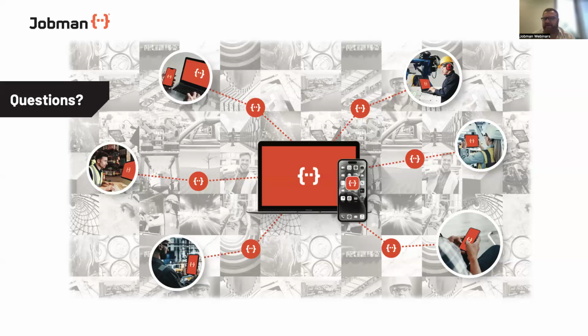You can put whatever you like in the SKUs field. That's not a problem. But what will break is your purchase ordering. The idea behind SKU fielding is that the SKU is determined by the supplier. The whole point of that is that the supplier is the one who dictates the SKU, because when you place the order, whether it be on an online ordering system or you send it to them via email and they enter those numbers, that's the number they use, because product codes and SKUs are universal. And one of the big reasons for that is, for example, if you're in the cabinet making space, Blum is a major supplier around the world.